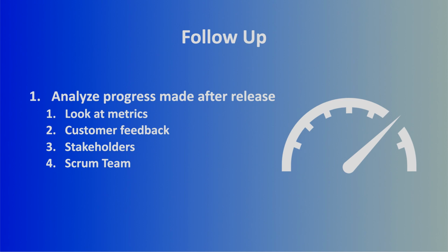Is it generating the right data? Is it successful? Does it make people happy? Are people buying it more? You want to go and look at everything you can to see if you moved the needle in the right direction. And this is really important, because if you didn't move the needle in the right direction and you were planning on your next sprint, further advancing what didn't work, it's probably a good time to hit the brakes and say, all right, we've got to reanalyze and figure out a different plan here, because what we've got isn't working for some reason.